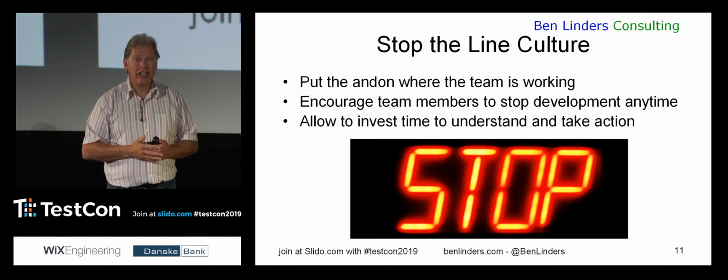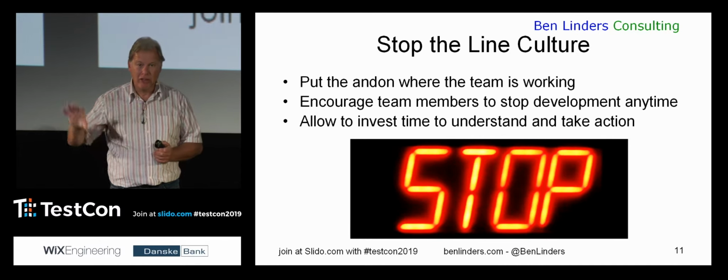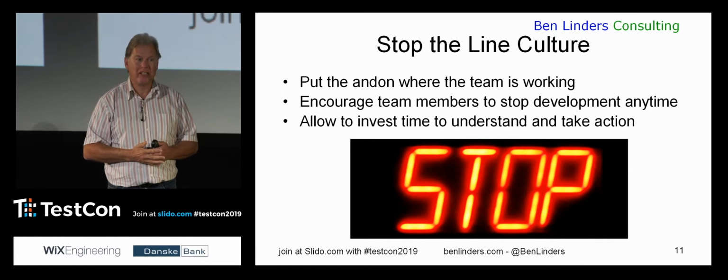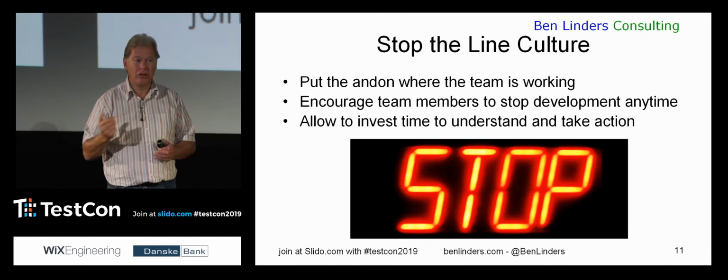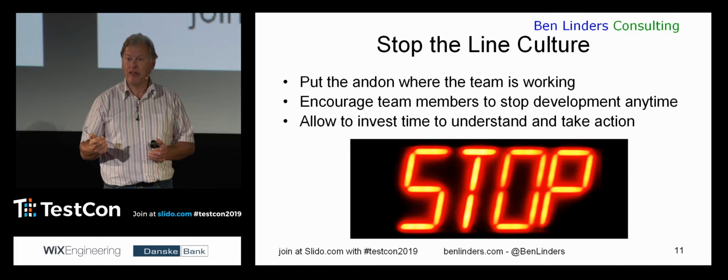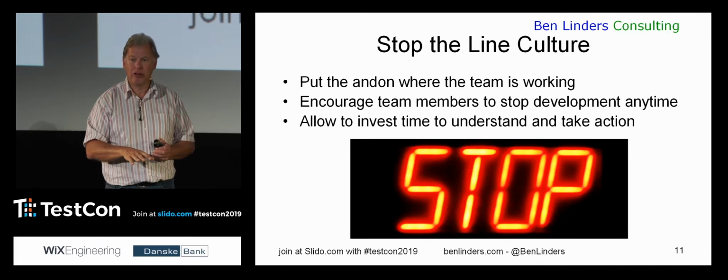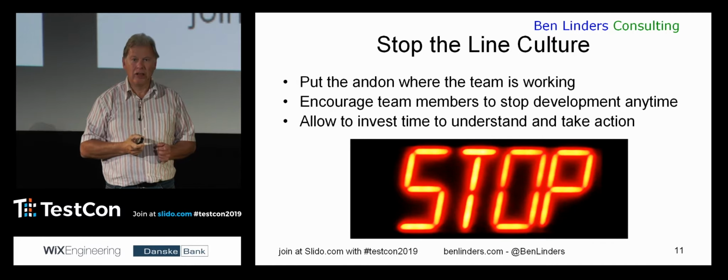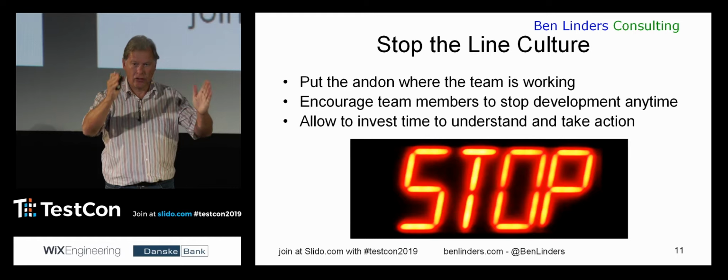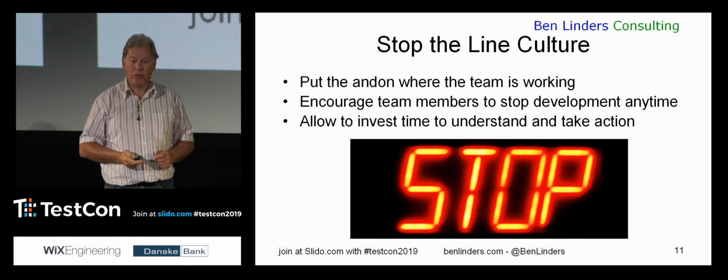Actually, if you've done this exercise in your retrospective a couple of times, bring it back to the team room. So the bell, the ending that you have, put it in your team room so that people can actually stop the line when they're doing development on a day-to-day basis. So they don't have to wait for the retrospective, but when they see the problem, step up, ring the bell and say, guys, there's something here that we really need to work on instead of just continuing our work. This is a problem that we need to solve.